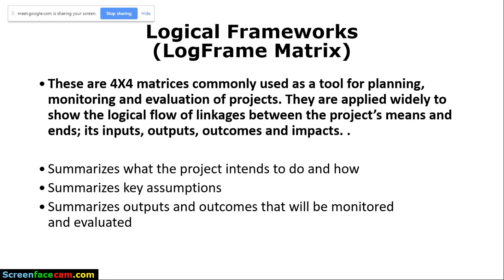We have to state the assumptions that are likely to affect my activities. I have to state the assumptions that may affect my outputs. I have to state the assumptions that may affect my outcome. And also there could be assumptions that are supposed to be stated that may affect my goal. That's the only new thing that we are introducing in the logical framework. The other things still remain the same.